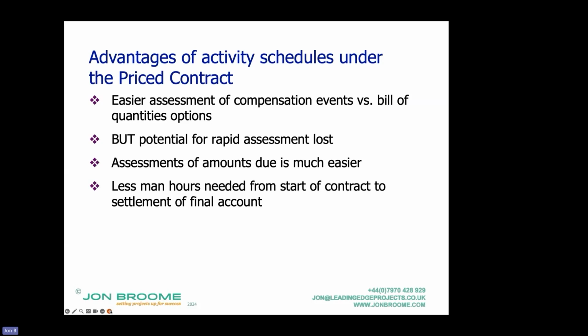Well, yes, if that's all that it affects, but there is research which says a change introduced during the contract typically costs 3 times as much as if it was in the original contract, and 2/3 of that is related to loss of productivity, the disruption and other effects, and just under 1/3 was delay, so the extra time on site.